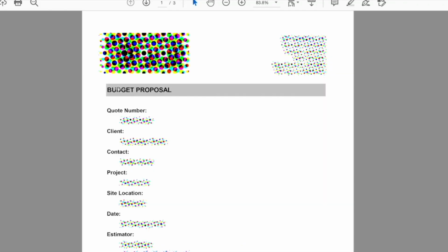So you can see here at the heading there, it's a budget proposal. This means that, again, the costs are still quite up in the air. It has not been discussed in detail. There might be some interior detail missing. Usually we start with a budget cost proposal, and then we can gauge from the client whether we need to allow for more or whether we need to shave some off, and then we move into more detailed